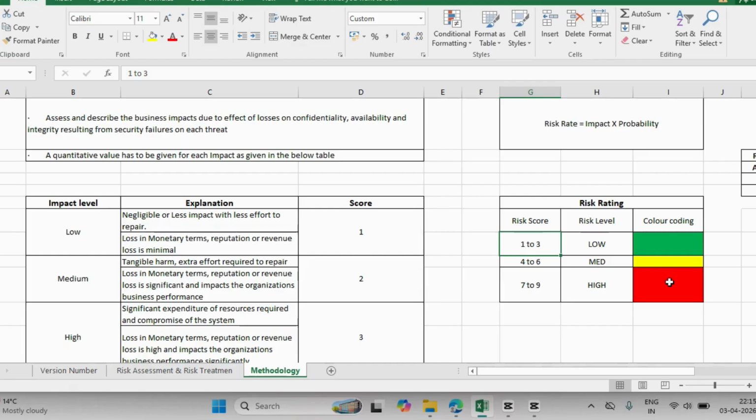If my risk value is between 1 to 3, I'll accept. That's nothing but your acceptance value. If the risk value is less than 3, those risks are accepted by the organization. Maybe they do not require mitigation plans and all. If the risk value is more than 4 up to 9, definitely they want to treat those risks. Mitigation plans and additional controls are applied to mitigate that. Those things, I'll show you in that example here.